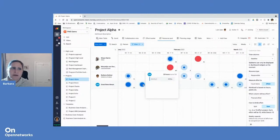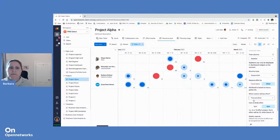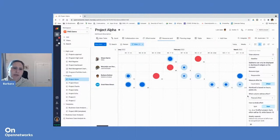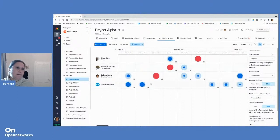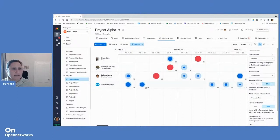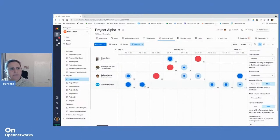The blue dot size is determined by the hours, the amount of hours that we put into the main table around planned effort. So it will calculate all the items, all the activities that Grant has in a particular week and reflect that in that blue dot.